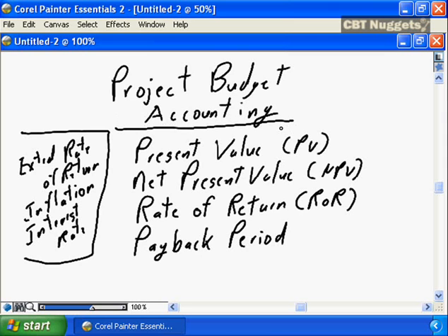I keep saying you may or may not need to do. If you're dealing with a short project that covers a 6-month window, I would suggest, and I think I would be very accurate with this, you will need to apply none of these accounting principles, because the difference between the present value of money now and the present value of 6 months hence is very much the same. There's limited application of inflation or interest rates on that money. But if you're dealing with a project that covers 2, 3, or 4 years, then there is in all likelihood that you will need to work with your financial analysts to work through the present value of money, to work through discounted cash flows, because then your project will be very much impacted by inflation and interest.